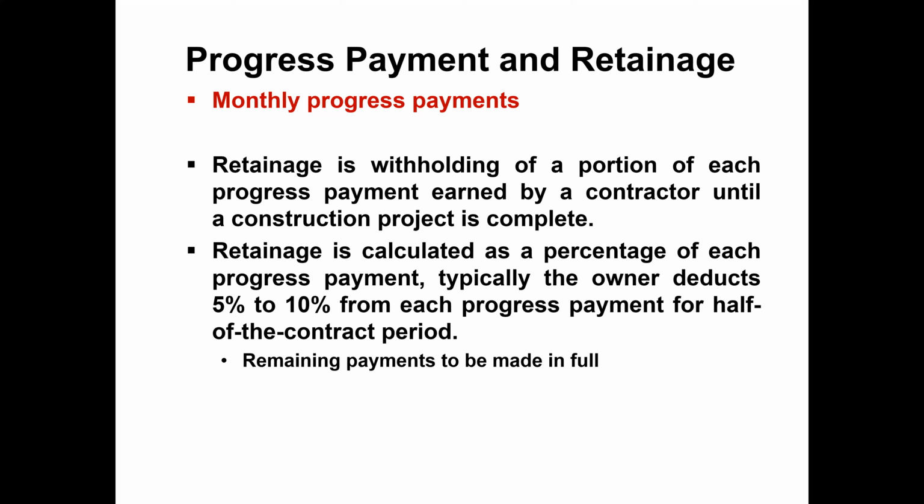So, as we said, this retainage is always deducted for half the period of the contract. But sometimes, for example with a 13-month contract, it will be mentioned that retainage will be for 6 months or 7 months. For the remaining months, the payment will be full, with no deduction. So the deduction will be for half the period of the contract, whatever the agreed amount.